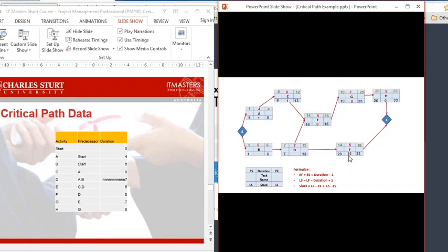So we've got 15 days slack up our sleeve. We get 0. We get 0. Okay, so there are a number of activities that have 0 slack. Essentially, they represent the critical path. Anything where you don't have any room to play with ends up being the critical path. And that's where the project manager has got to focus their energy and time on ensuring that we work with the critical path. And they're the red arrows highlighting what the critical path is.